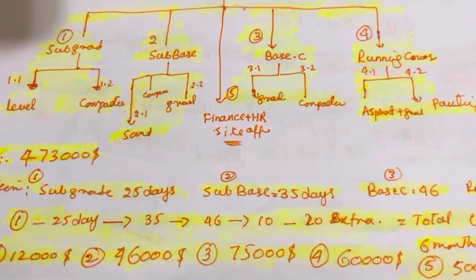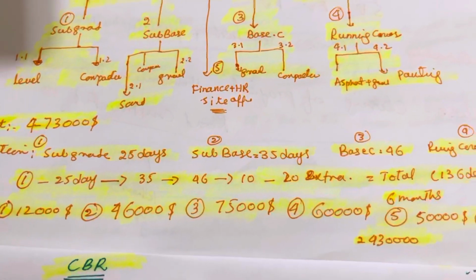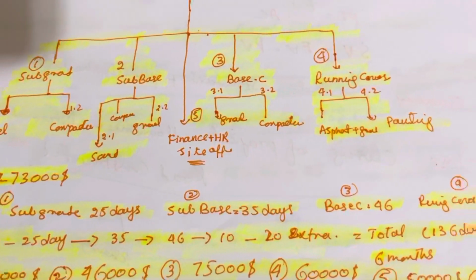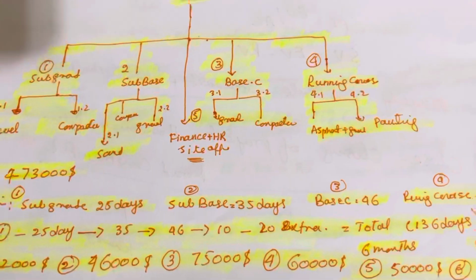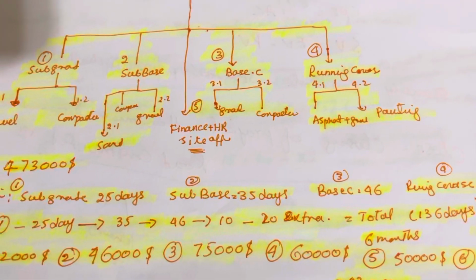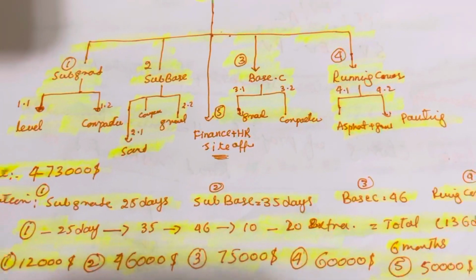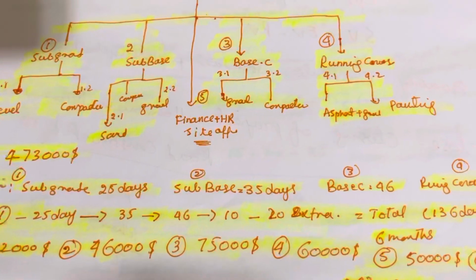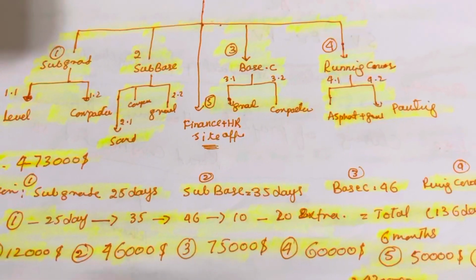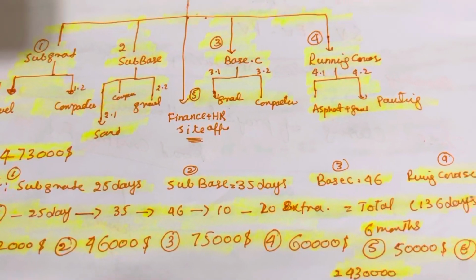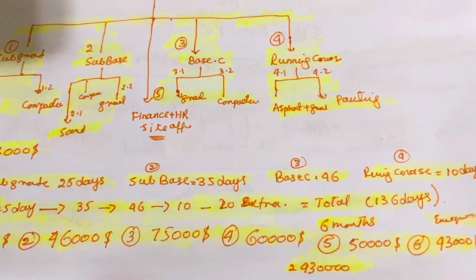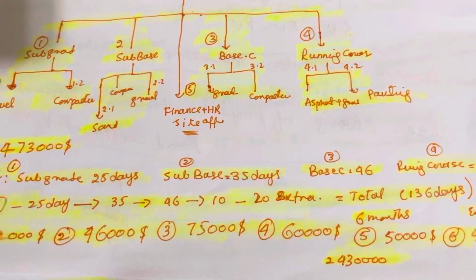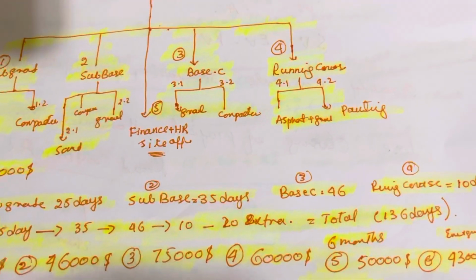In Microsoft Project, you're going to exclude 2 days in each week, Saturdays and Sundays, and holidays in Ontario. When you remove those, we get 20 to 22 working days per month. So 6 months is the period, including 20 days extra as emergency.